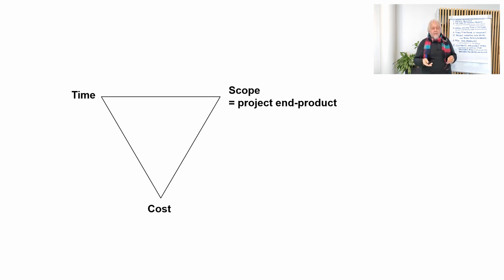For example, if we would position ourselves in this corner, it means that the time objective is the closest, and that means that the time objective is most important in decision making. And then come the two others. But because we must have a clear order of importance, we cannot position ourselves in this corner because, okay, time would be the most important, but then the scope and cost objectives would be of equal